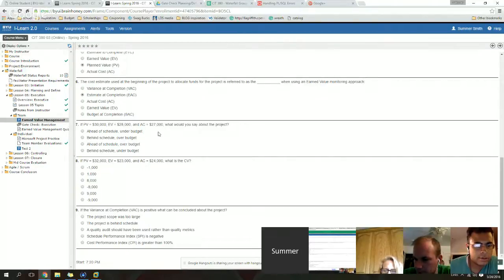If we try to find SV, that will be the schedule variance. That will be EV, which is 28,000, minus 30,000. So that will give minus 2,000. So does that mean we are behind? What does SV stand for again? Schedule variance. Okay. So that might be behind schedule and under budget? Yeah.